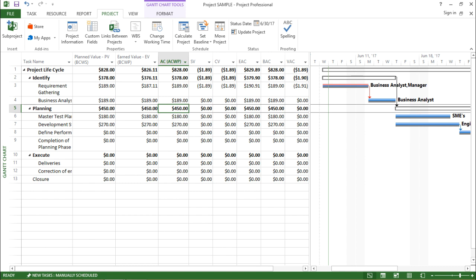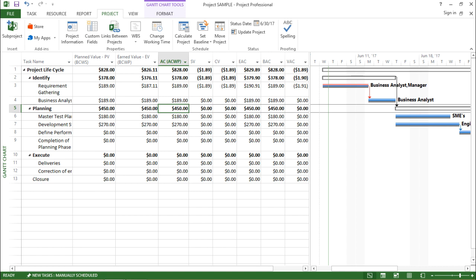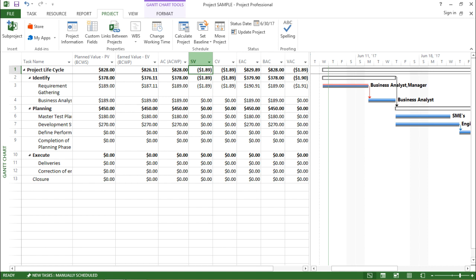Moving on, the next column says SV, that is Schedule Variance. Schedule Variance is the difference in cost terms between the current progress and the baseline plan of a task. In simple words, it shows the difference between the Earned Value and the Planned Value. If it is negative it will appear in parentheses, but if it is positive it will be shown normally. The difference shown here is $1.89, which I can see in the Schedule Variance column.